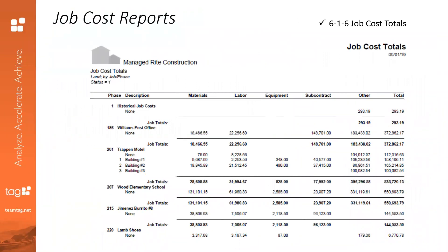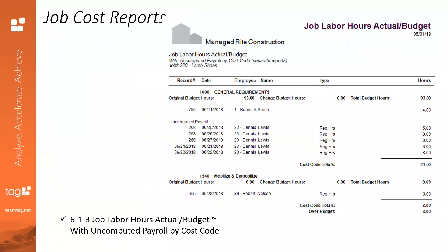Here's another great overview: Job Cost Totals. This particular version includes phases as well, so you can see a job with all of its job cost totals by category, broken up by phase. There's also the Job Labor Hours Actual versus Budget report, which includes uncomputed payroll. If you're using a tool like Sage Field Operations to bring in hours immediately, or another integrated timekeeping option, this is great — it gives you a lot of detail and can be scheduled to send out to project managers regularly.